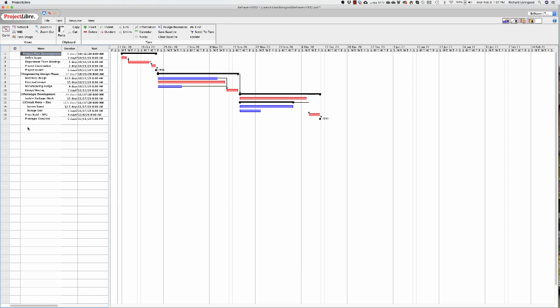Now, one thing we didn't talk about in Unit 2, but we'll mention it right now, is milestones. There are two of them here. The first one is the project launch under project plan development. The second one is under prototype development, and it is prototype completion. And the milestones have zero value to them. That is, there's no duration. You can have duration with them.